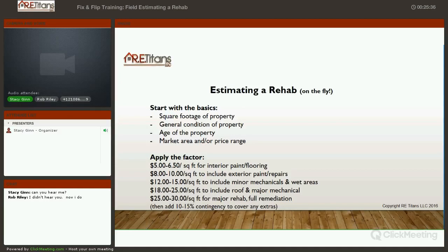And I would say we're talking about houses that cost anything from $100,000 starting to get into your $350,000, $400,000 houses, and then we'll push upwards to around $100 a foot when you start to get into some higher end finishes and stuff like that. So when you look at a house on the lower end and you could replace that property, concrete brick studs and all, for $60 a foot, a new property is going to comp higher than a rehab property.